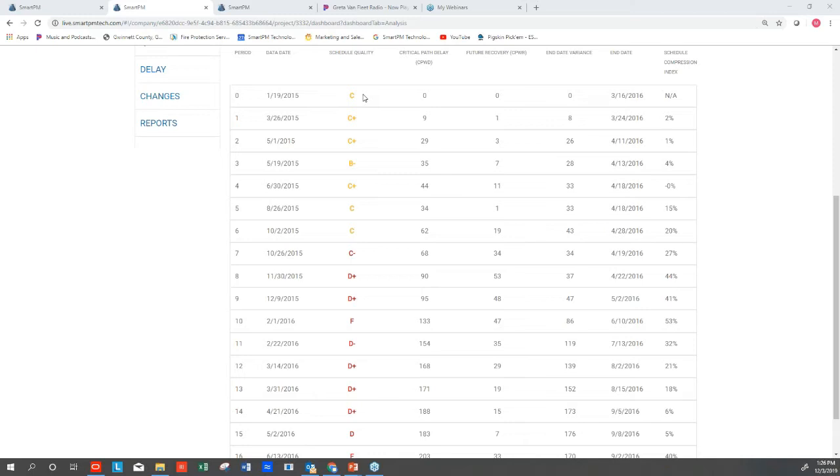Because if you have a schedule that's of poor quality and just generally not reflective of accuracy of the job in the beginning, not highlighting the true critical paths or whatnot, then you have a problem. And just a perfect example of that, and I don't think that this is the case here, but I see this all the time, particularly in high-rise buildings where people forget to put in crew logic.